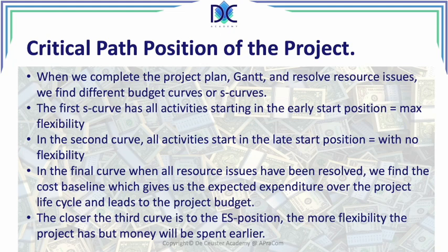Another important element is when we look at the cost. When we put all the activities in early start, we will be spending the money very early, at the beginning, at the earliest when we start with an activity. When it's more to the late start position, we will be spending the money later because the activities will start later.